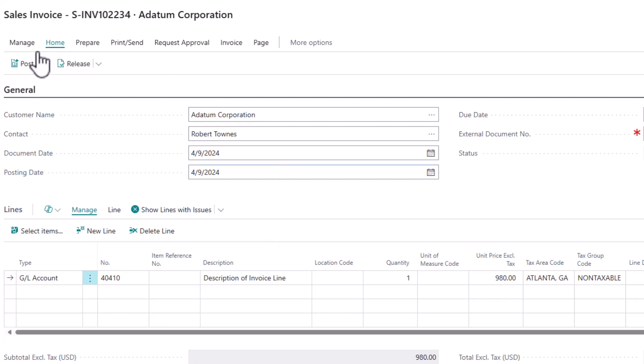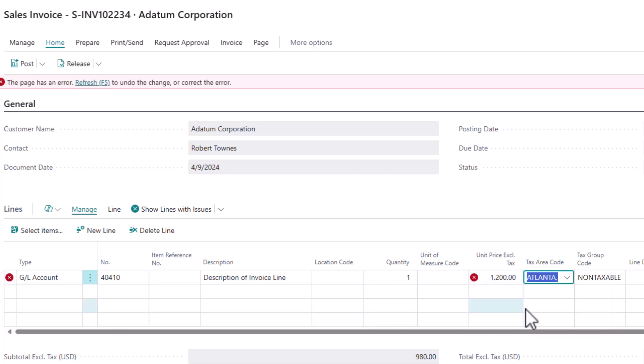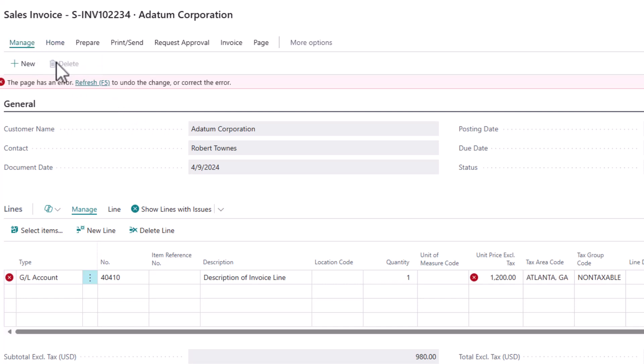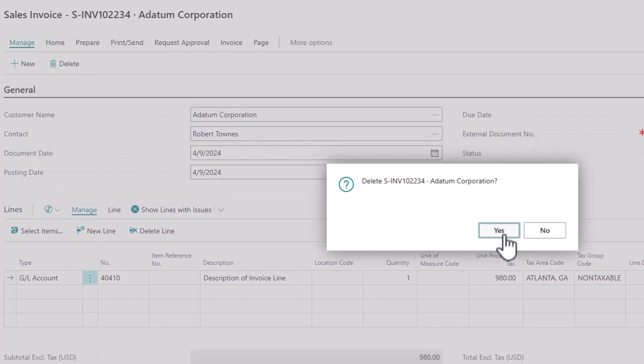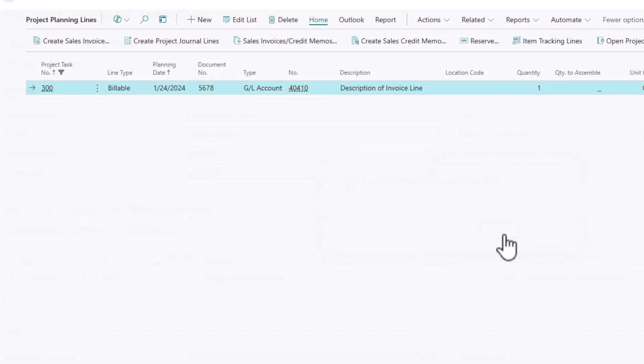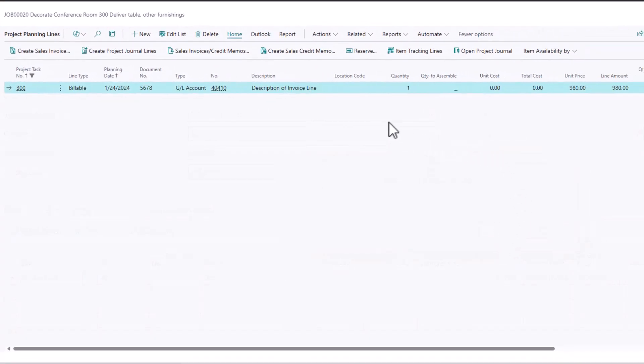And then I can simply post this and that will record an invoice amount against this customer. A big thing to take into account, I can't make changes here. So once I've added it to the sales invoice, I can't make changes. The system knows that this is linked back to a project. And so if I wanted to make a change, I would go and delete the sales invoice. And the system knows that it's been deleted. It knows it's no longer on an invoice.